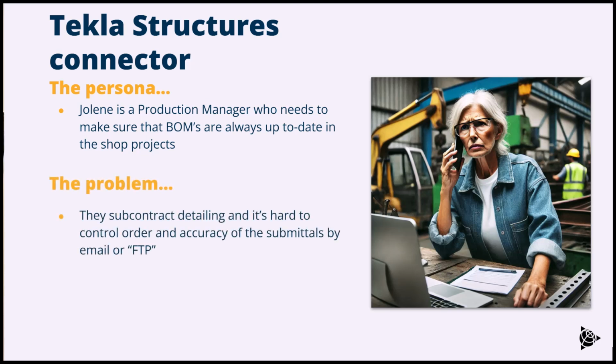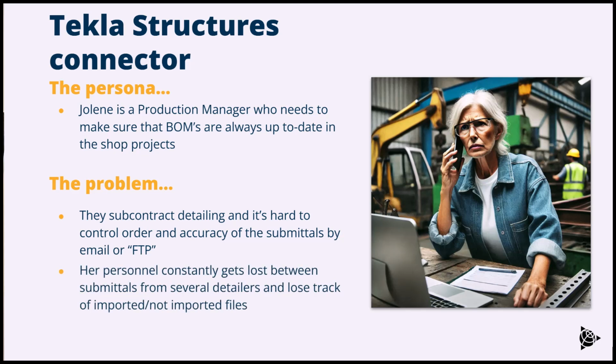Now, some of the problems that she faces is that they subcontract detailing, and it's hard to control the order and the accuracy of the submittals that are received by email or FTP, right? Especially when they could receive 2 or 3 submittals during the night, or them together. The order of the submittals actually matters.